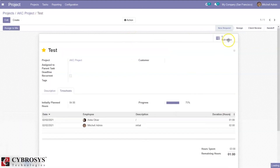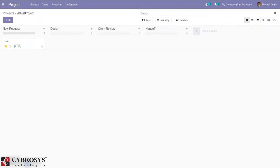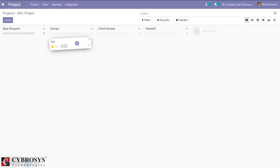You can save the task, and if you want to add subtasks you can create and divide the task into subtasks. The timesheet is added, and you can see the remaining time to complete this task is one hour. If you want to move this task to the next stage, you can do so from here.